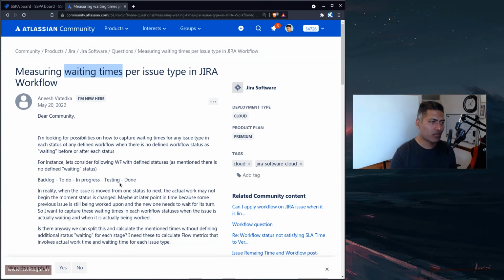Because we do have similar metrics like lead time and cycle time, and this information is usually used to understand as a whole how long we are taking to deliver something. For example, if we talk about cycle time, basically from the beginning till the end, are we able to deliver this particular epic within 2 days or 3 days or something similar.